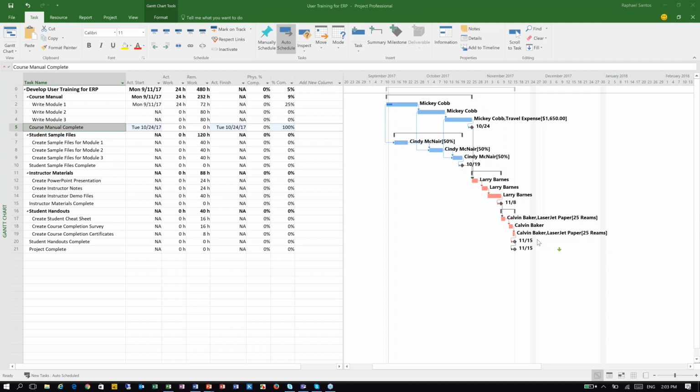So you have a change in the scope of the project. What you have to do in there, as soon as you have this change, is reflect this change in the baseline. You are going to be updating the baseline 0. So then the baseline 0 is going to be reflecting your current plan, your current approved plan, I would say. And then you save this information in baseline 2.